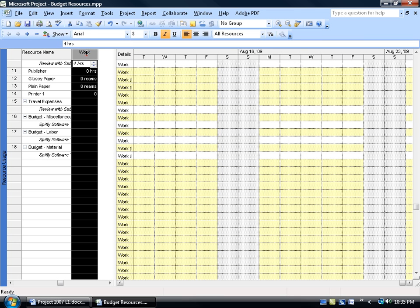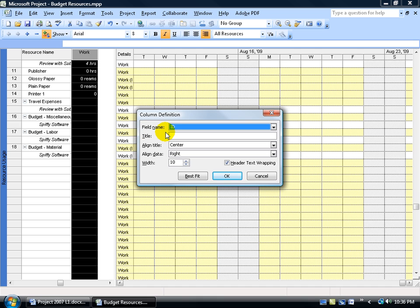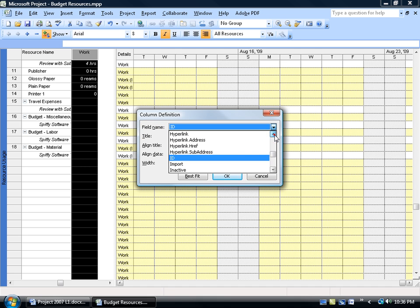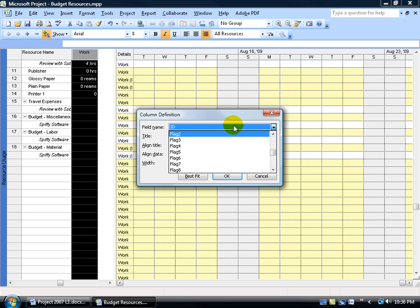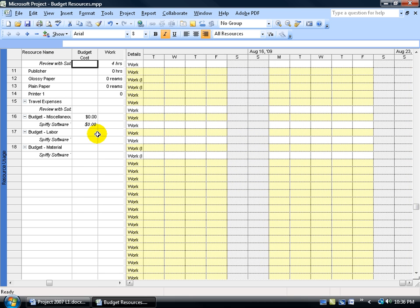To insert the budget cost column, click on the work column header to select it — since we want to insert before the work column. Either go to Insert menu and select Column, or right-click on the column header and choose Insert Column. In the field dialog, type BU for budget to filter, then select Budget Cost and click OK. Notice that the zeros are placed right next to the budget cost resource, signifying you can only enter values in that column for the budget cost resource assigned to the project summary task.